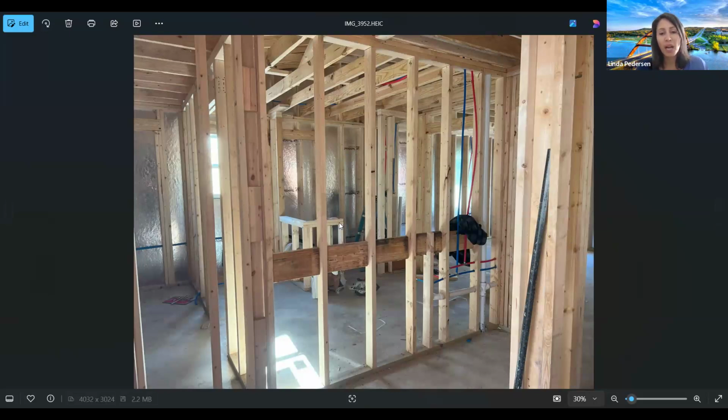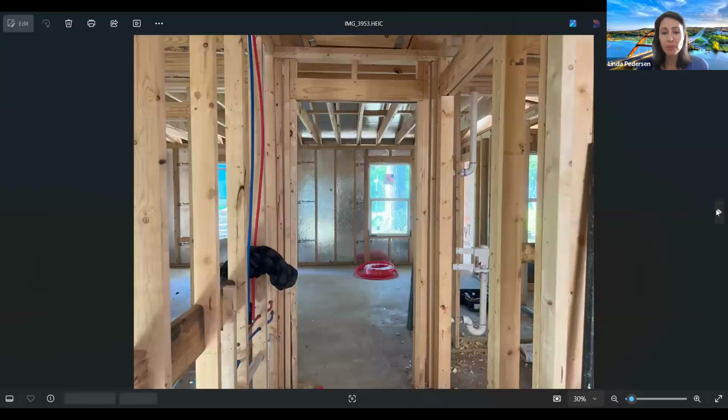On the other side, we built a half wall because now we made a walk-in shower. And what we did is we actually bought the glass that we wanted. So it wasn't custom, didn't have long lead times, and then built to fit the glass for the showers.